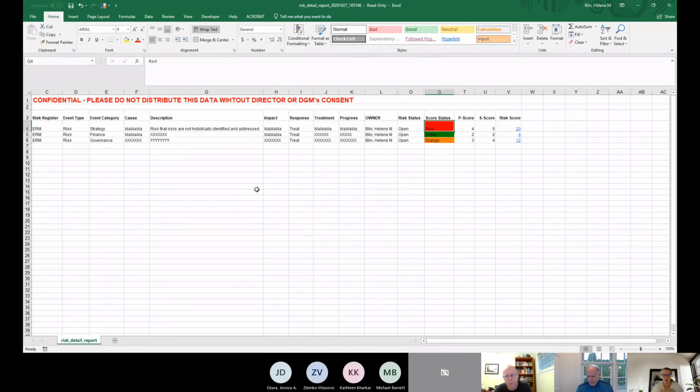And to come back to the point that Michael was saying earlier in this meeting, what you really want to do is to have your causes and your consequences for this risk. For the same reason as I mentioned to Mike a moment ago, because it will help you tremendously afterwards to design your mitigation strategies. Because mitigating a risk is about controlling the causes that you can control, and or reducing the impact if the risk materializes.